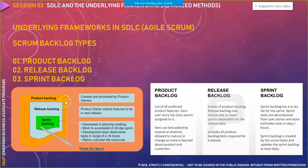Product backlog is created and prioritized by the product owner. Release backlog is where the product owner selects features for the next release. Sprint backlog is what the development team decides to assign to themselves. One important thing to highlight: whenever you are doing sprint planning, you don't assign things to the development team — team members self-assign based on their capacity and skills.